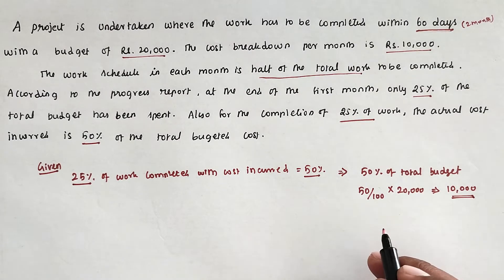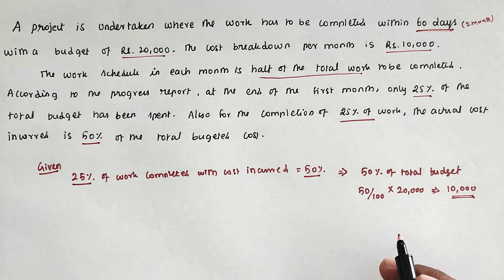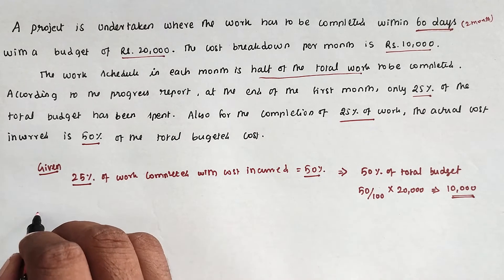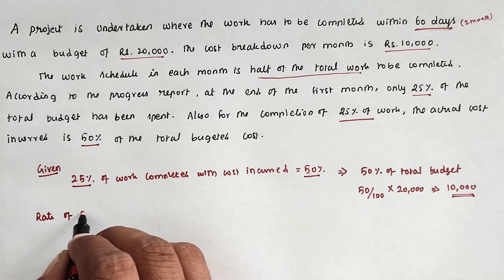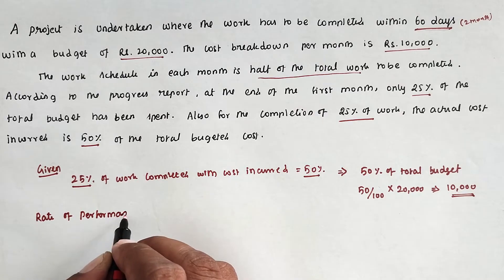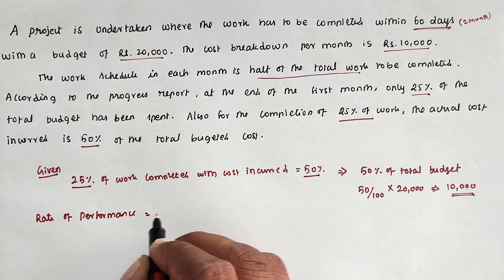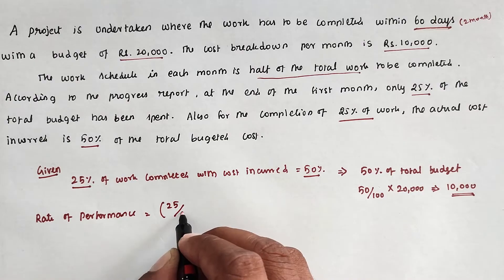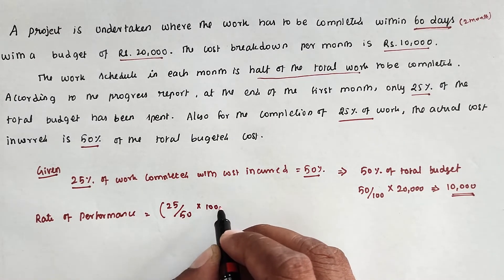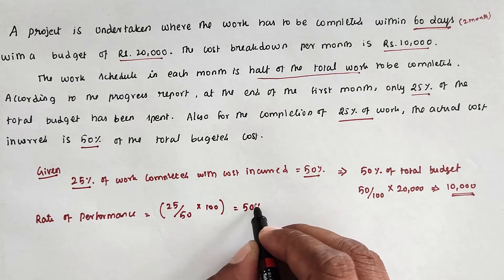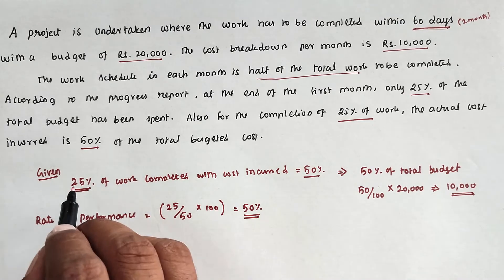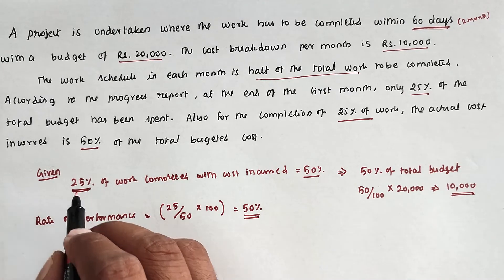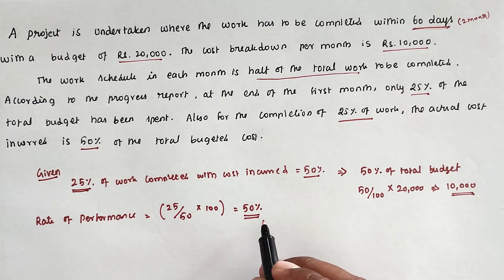The rate of performance can be expressed as a percentage. Rate of performance = 25 divided by 50, multiplied by 100, which equals 50%. So, 50% of work was to be completed within the month, but we completed only 25%, giving a rate of performance of only 50%.